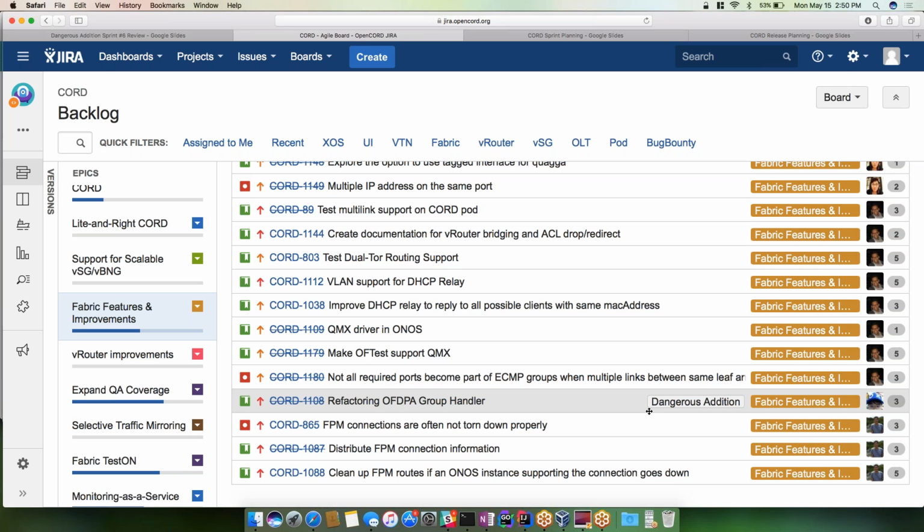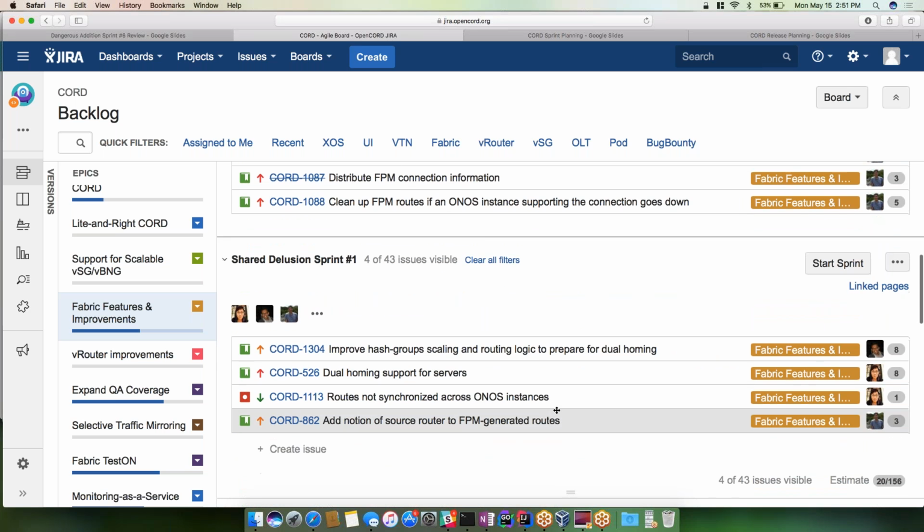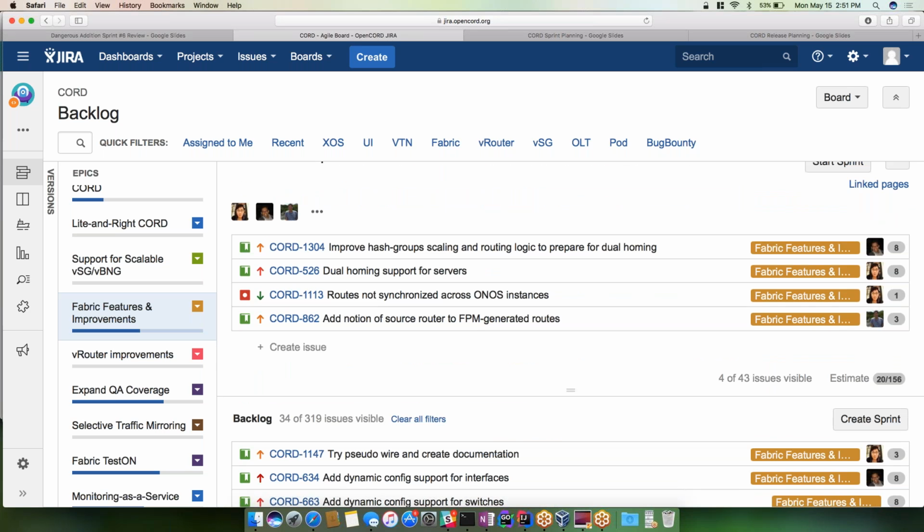So what I can do is I'll manually move everything to backlog. So my assumption is you consciously decided what you're going to do in sprint 1. I'll manually move everything that is in the existing sprint that isn't done into the backlog. Yeah, that would work. So that should do it. Okay, anything else?